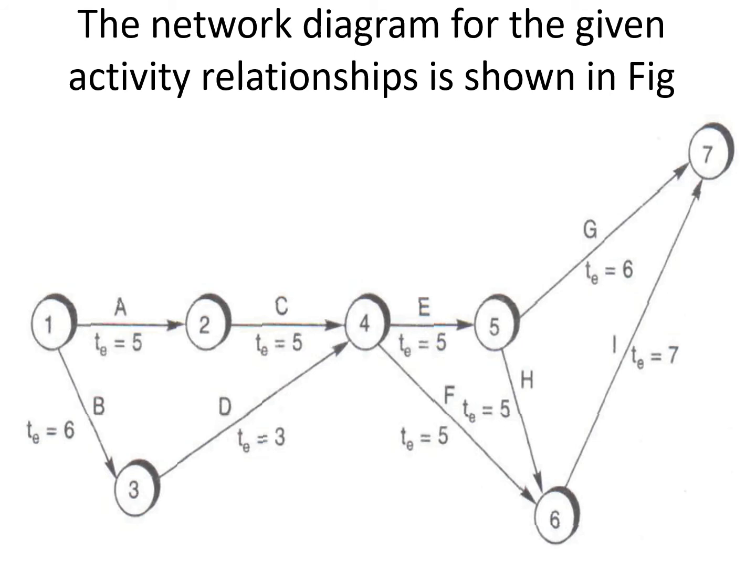A predecessor event is an event that immediately precedes some other event without any other events intervening. An event can have multiple predecessor events and can be the predecessor for multiple events also. A successor event is an event that immediately follows some other event without any other intervening events. An event can have multiple successor events and can be successor to multiple events also.